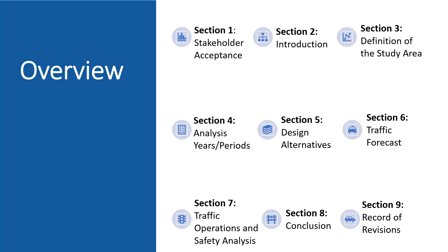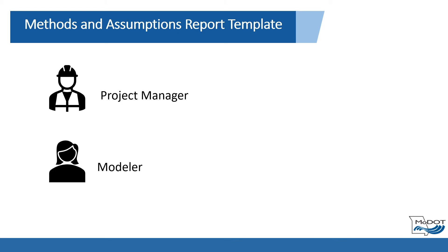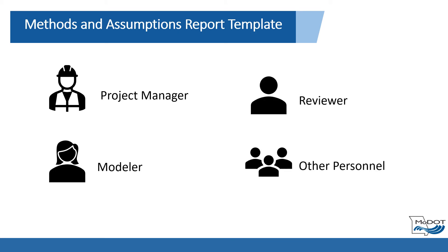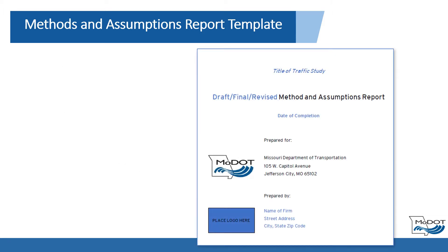The intent of this module is to inform the TIA Methods and Assumptions report. The sections in this module correspond with the section numbers of the Methods and Assumptions report. It is important for the project manager, modeler, reviewer, and other involved personnel to develop an effective plan for conducting the necessary analysis. All parties must also agree on assumptions to be made to complete the analysis. Therefore, MoDOT may require a Methods and Assumptions report to be drafted and agreed upon by MoDOT and shared with stakeholders for all traffic impact analyses.